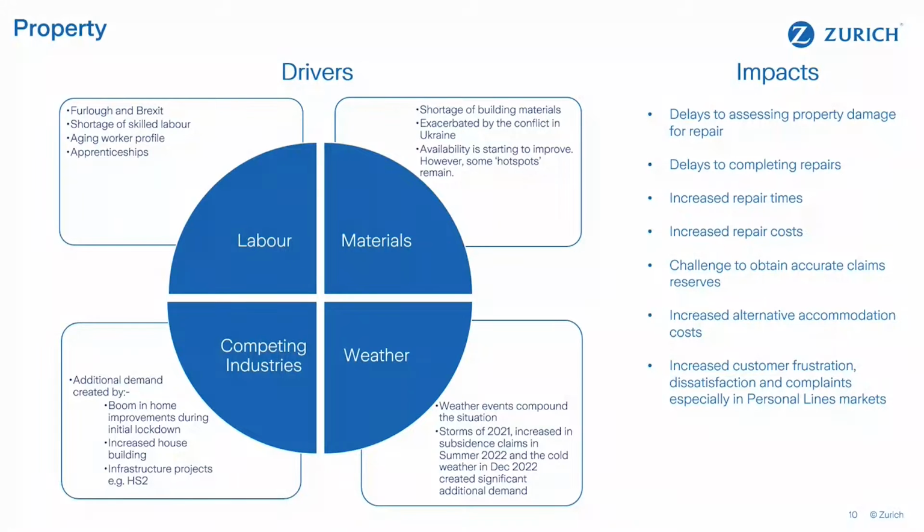Availability of building materials is generally starting to improve, and some materials prices are easing, especially in terms of timber, except for birch plywood, which obviously comes from Russia. In 2023, we may actually see quite low building material inflation because of price reductions in some areas, before returning to approximately 2% next year. But those materials which are very high in terms of energy input, such as bricks, plaster, tiles and glass, will probably still see prices rising.